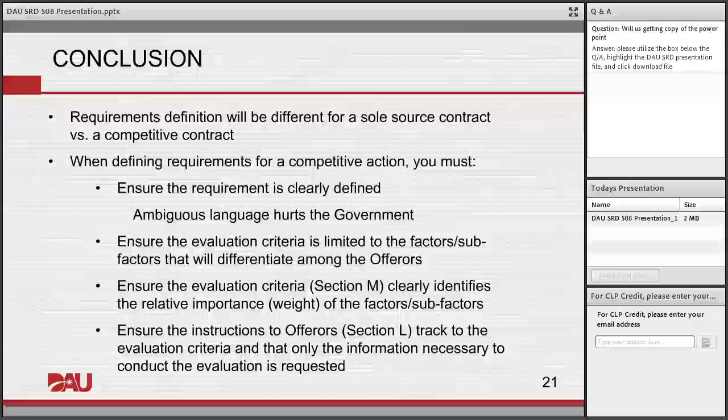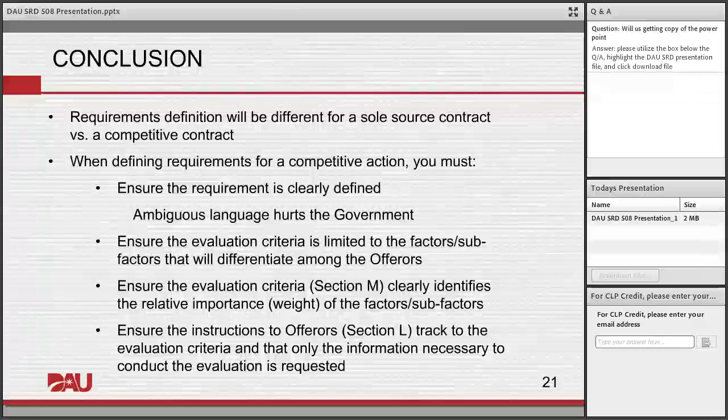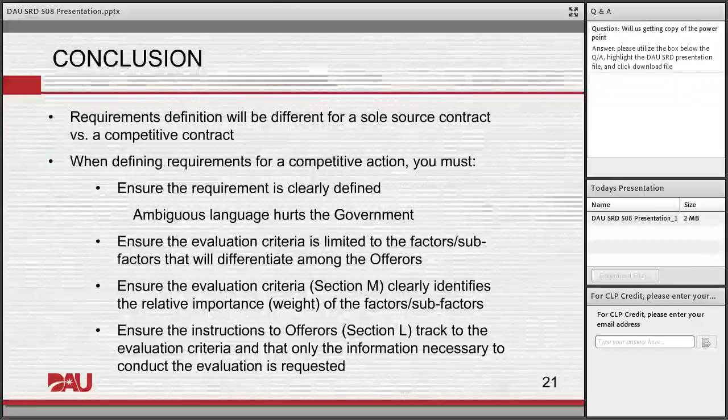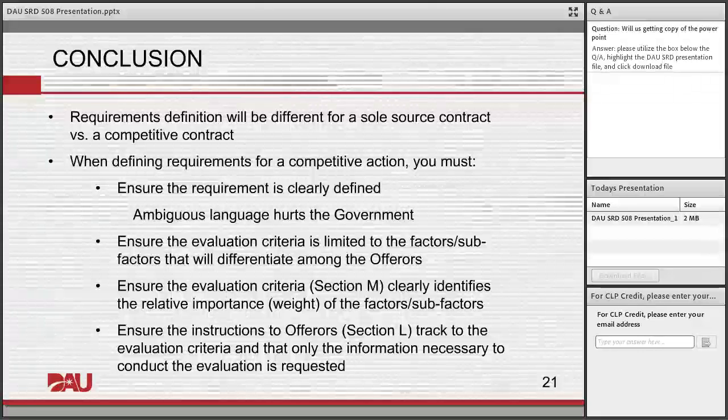But what I would tell them is, in order for you to submit a technically acceptable proposal, you have to give me a plan that details what shingles you're going to use by part number so that I can verify it meets my need. What labor are you going to use, because we want to make sure they are in accordance with the wage determination. So you want to make sure they're paying the minimums and those kinds of things.